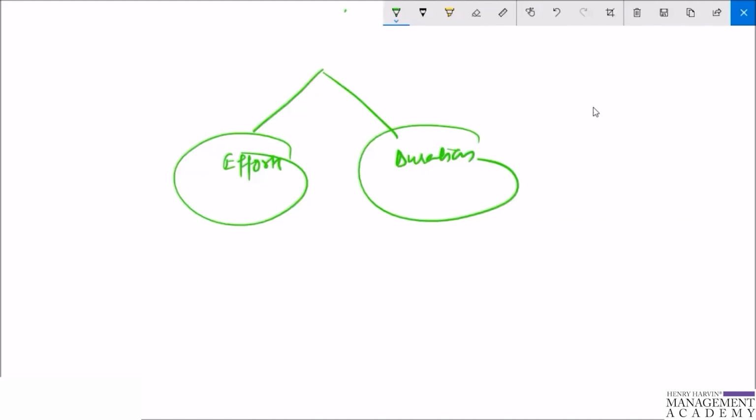Second, the team will need to put forth some ongoing effort to estimate any new stories that are identified during an iteration. One way is to hold a very short estimation meeting near the end of each iteration. Alternately, as I told you, just hang an envelope on the wall where you keep the story cards, and whenever the team comes to a discussion, they come and discuss and estimate these stories.